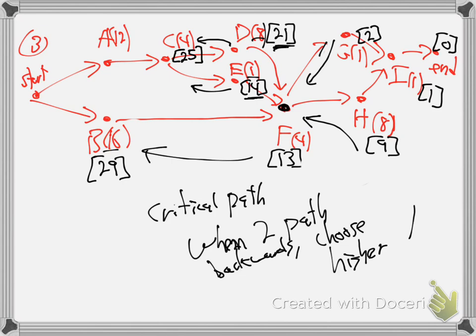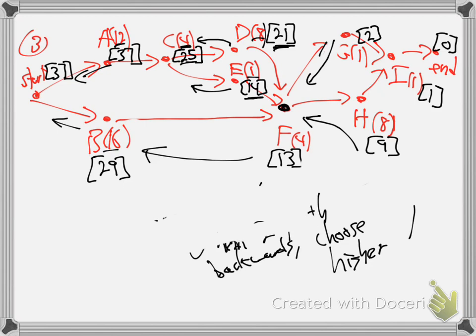So I'm taking the bracket number, adding the parenthesis every time. I'm taking the bracket number, and as I walk back, I add the parenthesis. 25, and then add 12, what's that? 37, and then which of these two go back to the start? The higher one, 37. There we go. So there's the bracketed numbers. That was a lot of work.